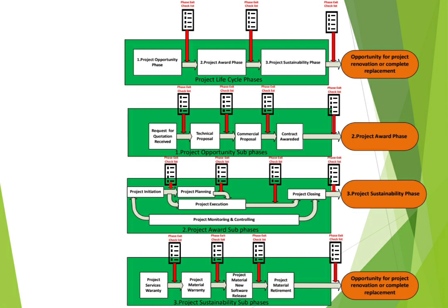The expenses for opening bank guarantees, for the customs clearance of your material, for the logistics, for the site team at the site, their daily allowances, all of these expenses you also need to plan properly. So after that, you will come up with the cost baseline, which you need to review with your manager and agree that this finance plan for this project will be accepted as the baseline cost plan.